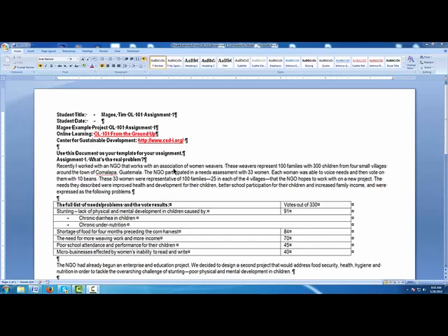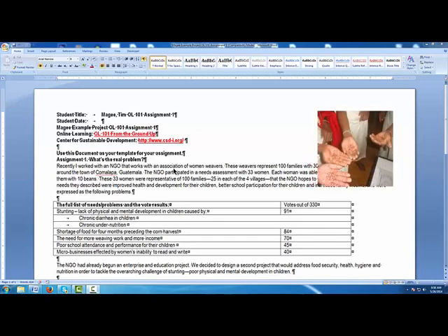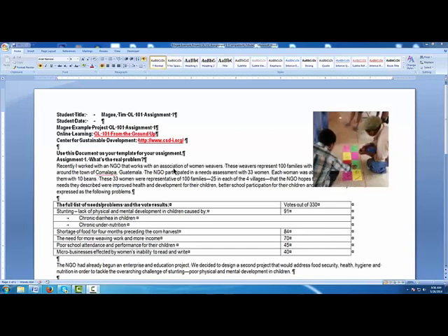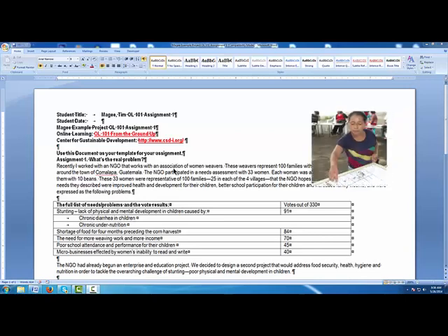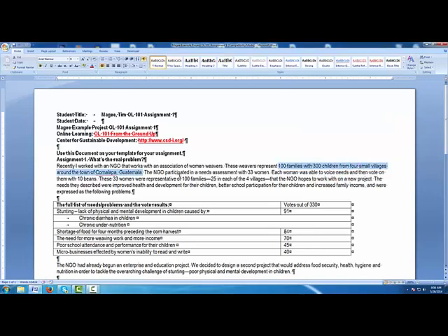Let's get started. In the Assignment 1 Needs Assessment, you created a set of drawings or perhaps a chart to capture community member perception of their needs and challenges. You then likely laid the drawings or the chart on a table and asked participants to each place 10 voting tokens on the problems that seemed the most important to them. They could place all 10 voting tokens on one single problem or spread them around several problems. You then created a new chart which prioritized the problems based upon their votes.